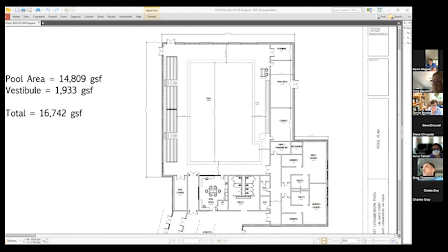On that subject, different question for the design team. Are there other implications to increasing the size of the pool other than simply bigger costs more? Like, are we tripping into more water, now more fixtures? Yeah, more water adds more fixtures. More water, I assume, adds more space requirements in the mechanical room as well. So, Dory, do you have an estimate? That would be interesting to have Michael confirm. Yeah, we can certainly reach out and talk to Michael about that. Dory, would you say I'd be way off in the $3 million number?